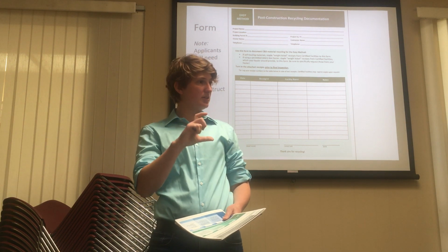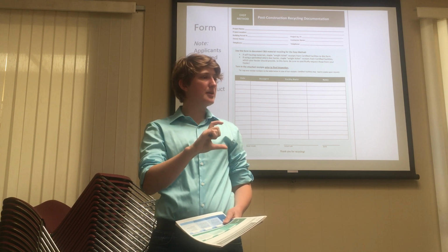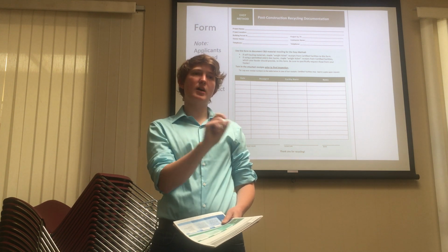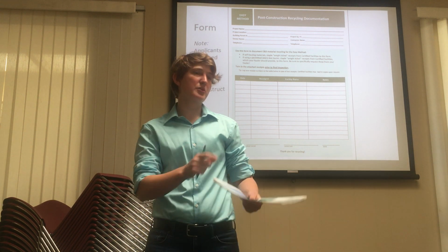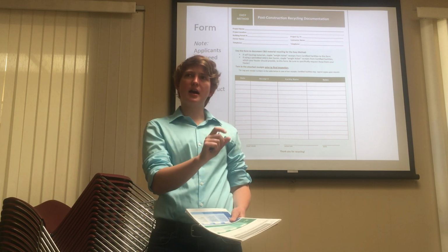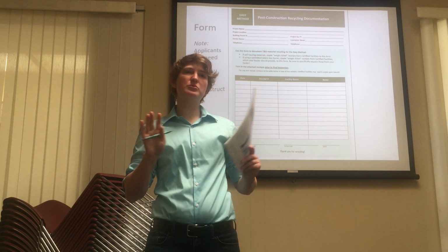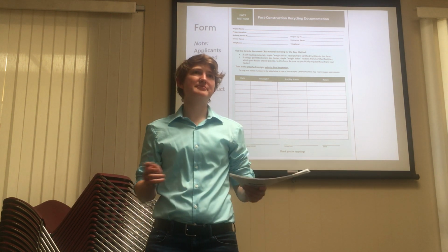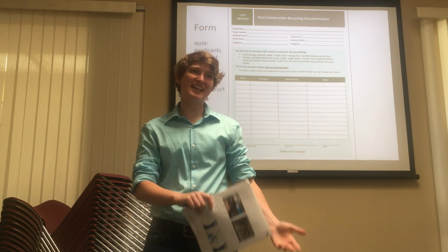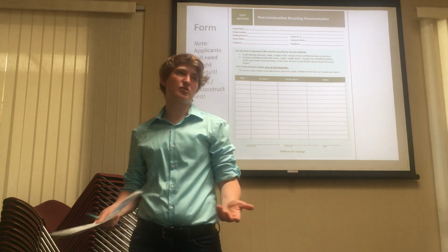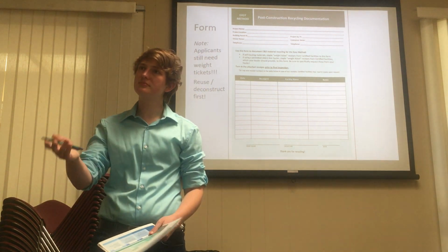We didn't bring copies of it, but it has a table that gives you guidance about what amount of material you should be expecting from a particular size per square foot. We have it by bedroom remodel or bathroom, because it's different amounts depending. It's really just an estimate. At the end of the day, it's going to be different depending on what the exact job is, so there's a certain amount of discretion and reasonableness you have to use. It's at least something.